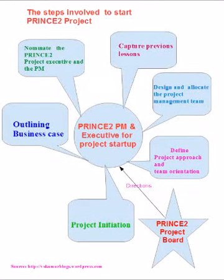In continuation of the previous session part one for the startup of the PRINCE2 project, I drew a chart to give some clarity on the steps involved. In this chart we can see you need to nominate the PRINCE2 project executive and the PM, capture the previous lessons, design and allocate the project management team, outline the business case, define project approach, team orientation, and project initiation.